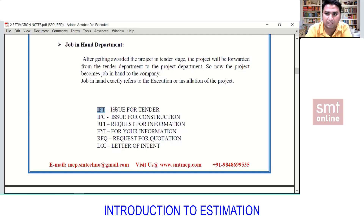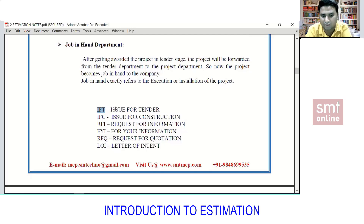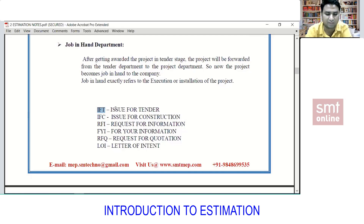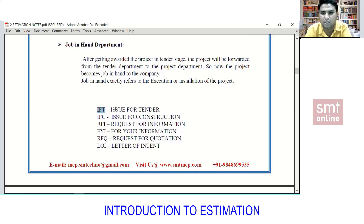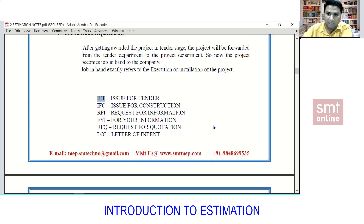FYI means For Your Information. For example, if my company is an electromechanical company and I receive a project, we get the complete project including HVAC, electrical, plumbing, and firefighting — sometimes even furniture and civil layouts. If I'm asked to quote only plumbing and firefighting, I share the project with colleagues in other estimation departments — HVAC and electrical — so the company might win more services.